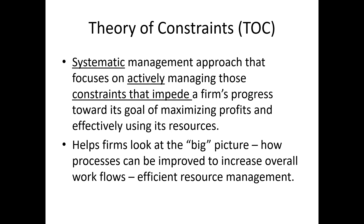No different than when we were in project management and we wanted to reduce the duration of a project — did we crash every activity? No! We were selective. We crashed activities that were on the critical path, ones that were important. So think of how the system flows.